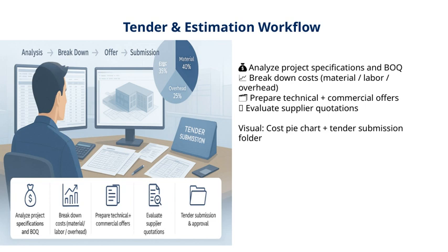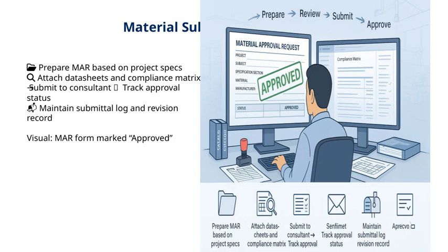This workflow is essential because it connects careful analysis with strategic decision-making, ultimately increasing our chances of winning the project. Let's talk about material submittal and approval. First, you need to prepare the MAR, or material approval request, based on the project specifications. This ensures that everything aligns with what's required for the project.